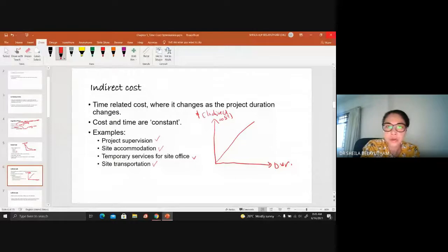So to reduce indirect costs, with a proper balance of the workers or site personnel required, the way is basically to shorten the duration. That covers all the salaries of the engineers and so on. There is no point that if you are delayed, you add on an engineer, because it does not serve a function on the site itself. So that's the idea.